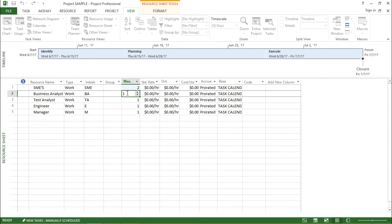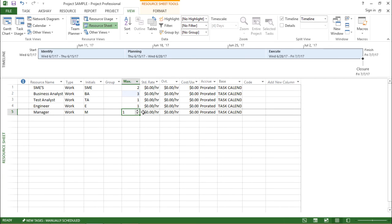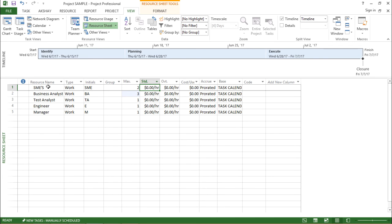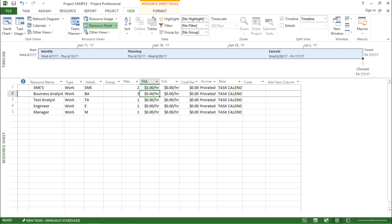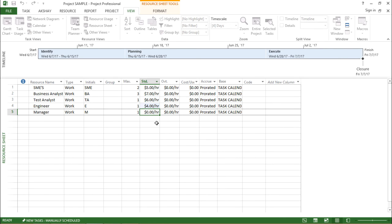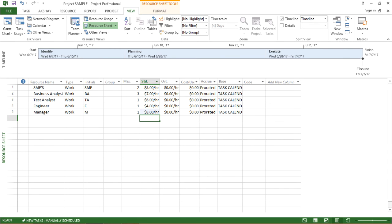Let me set SMEs to 2, business analyst to 3, and test manager to 1. Moving on to the standard rate column — it is asking for the standard rate for each resource. For SMEs it can be $5 per hour, business analyst $7, test analyst $6, engineers $8, and managers $8 per hour. These are the standard rates for all resources I will be using in my project.